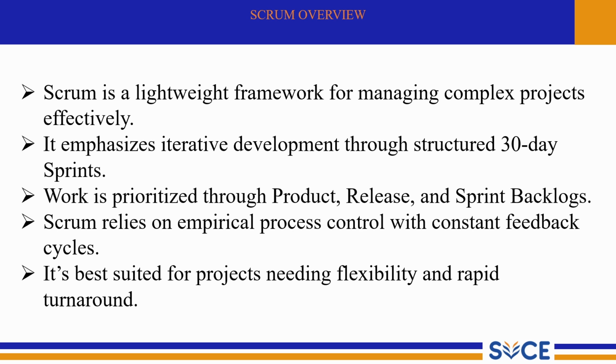And next point, it emphasizes iterative development through structured 30-day sprints. Work is divided into sprints, usually 2 to 4 weeks, originally 30 days. Each sprint produces a potentially shippable product increment. This iterative cycle ensures steady progress and helps teams adjust quickly.